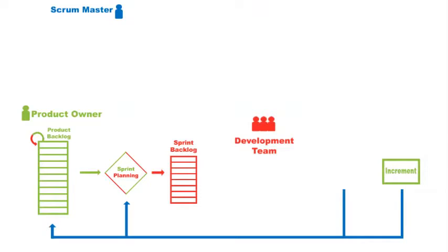First, in sprint planning, they identify a sprint goal. In business terms, this sets the value heading for the outcome that the sprint will actually deliver. Then the development team will select the product backlog items that they believe will allow them to deliver that sprint goal. After that, they will break those items down into either the tasks or tests that will allow them to deliver that sprint backlog.